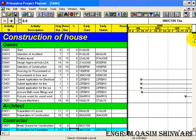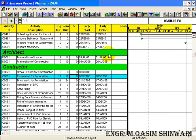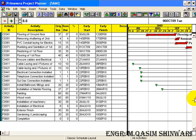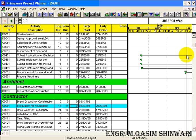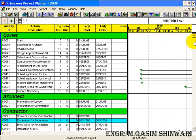Responsibility wise, the different activities. First responsibility is of the owner, second responsibility is of the architect, and the third is of contractor. It has also sorted the activities with respect to their early start date. So in this way you can do sorting and grouping.